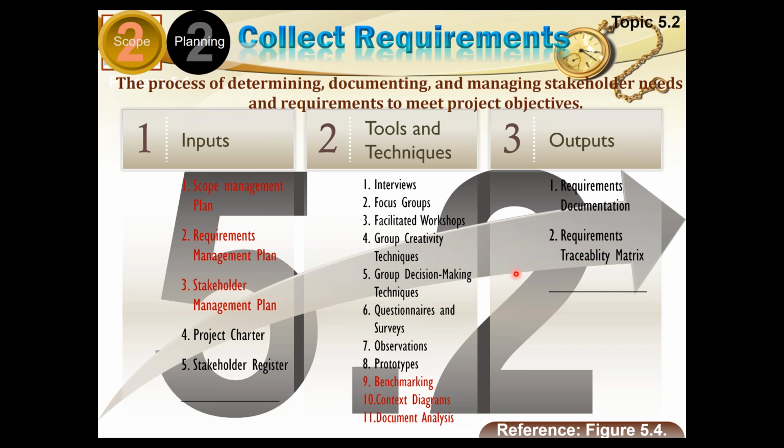Okay, if the number of audience from whom you want to collect the data is too large, maybe the whole organization is required to provide input, then we will do that through facilitation workshops. What is a facilitation workshop? In that we gather most of the people of the organization in a big hall, or conduct a seminar or something like that, and before you ask them what they want, you present to them what you have already understood and your ideas, how you intend to go about it.